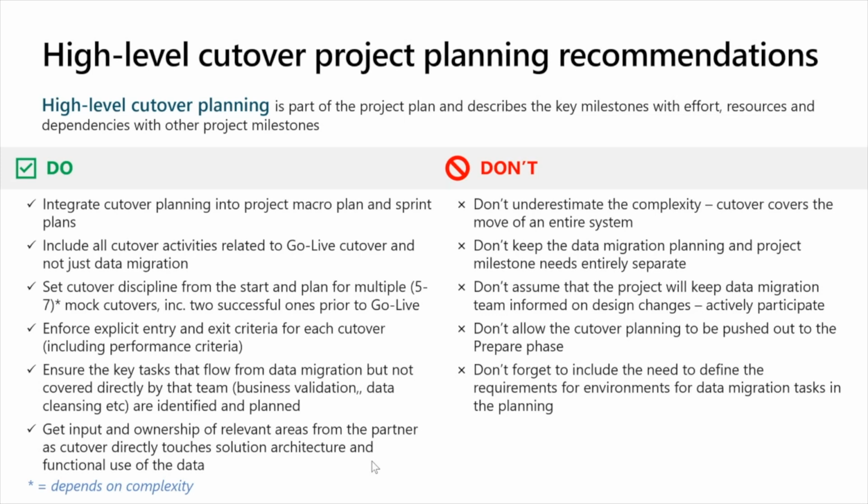It's no good having a shortcut where you're practicing something just to get data from A to B for a test cycle, because you're not practicing what you're going to do for production use, right? That can be misleading. It can also reduce the effectiveness, or the meaningfulness, of that test cycle because you've done something special you're not going to repeat when you do your production go live.